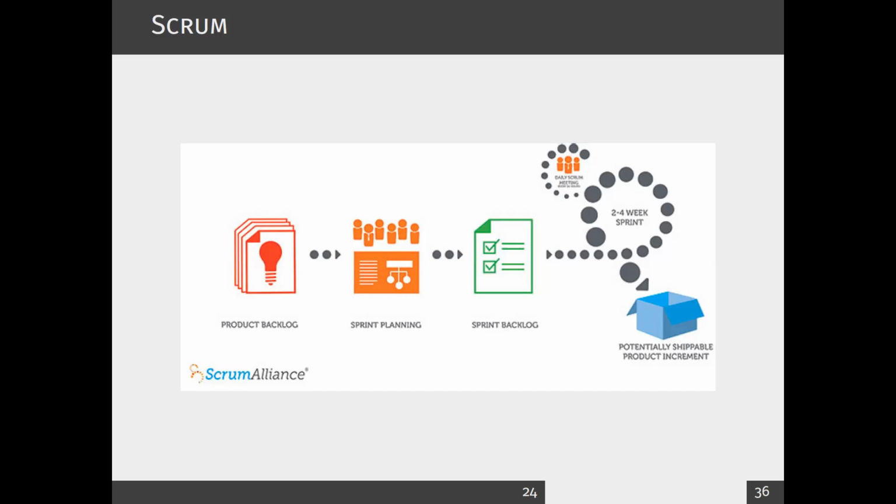The team meets daily, especially to look at the progress and identify any issues. They use the term blockers there, and that's how they work. For example, in each of these meetings, they might ask what features you are about to implement, how to implement them, and what the issues are. Things get sorted out during the daily Scrum meeting.